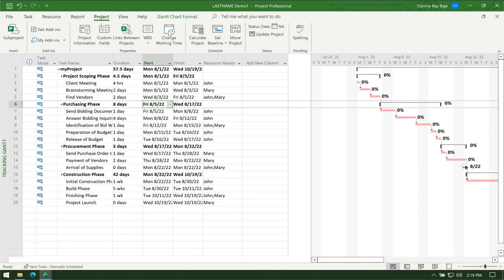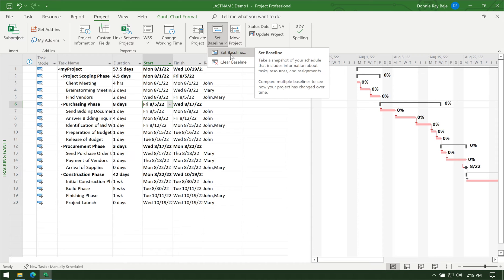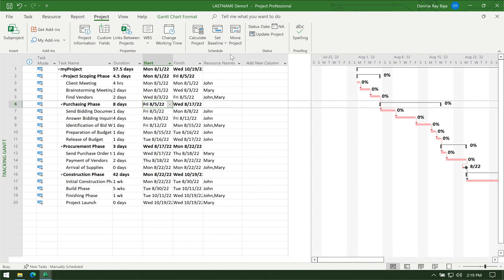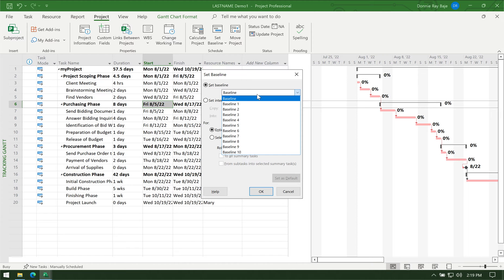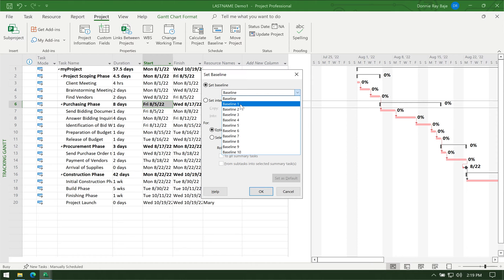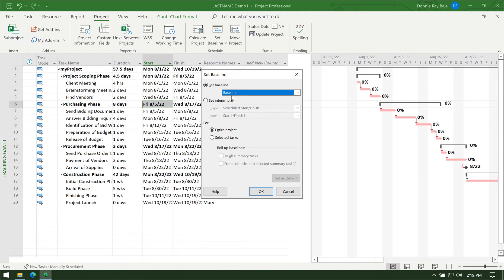You have to set that these are your target dates, these are your baseline dates. This will be the basis whether you accomplished your targets. Set baseline and then you declare what baseline number it is—is it the original baseline, the second baseline, a third baseline and so on. For this one I'll go for the original baseline, the very first baseline that I have. Click OK.